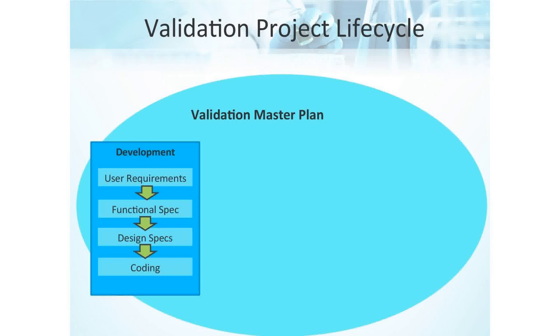Okay. So if we move on, required inputs into system testing documentation trace directly to the operational qualification, which we'll see in a second. Design specs are needed that include data dictionaries, physical schemas, and data elements that specify that the information is correct.